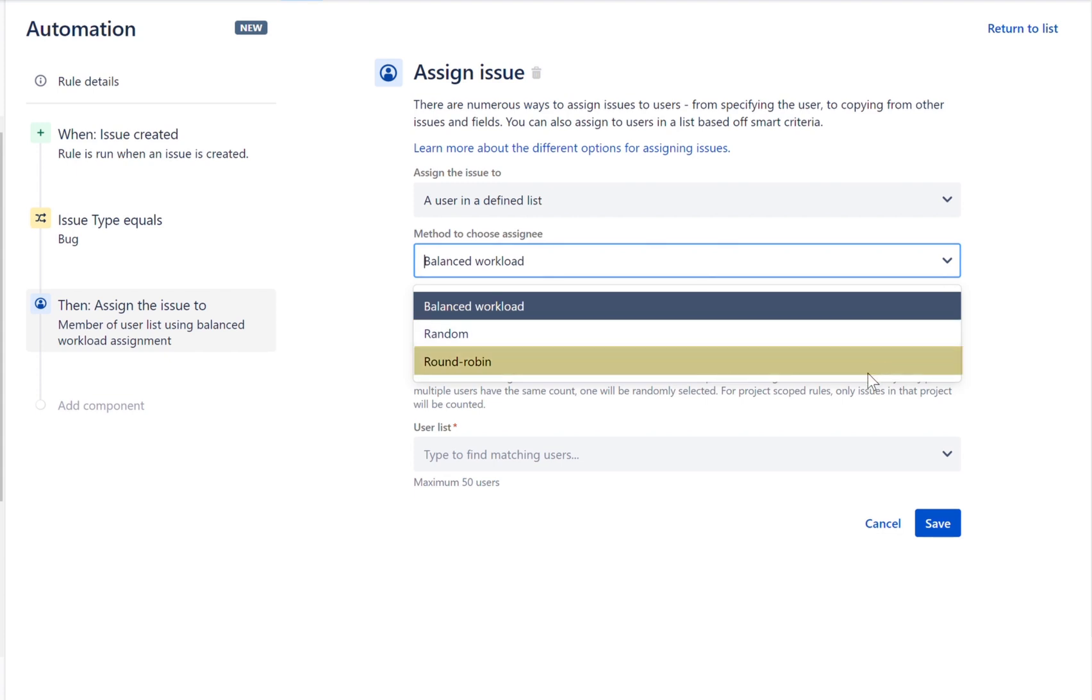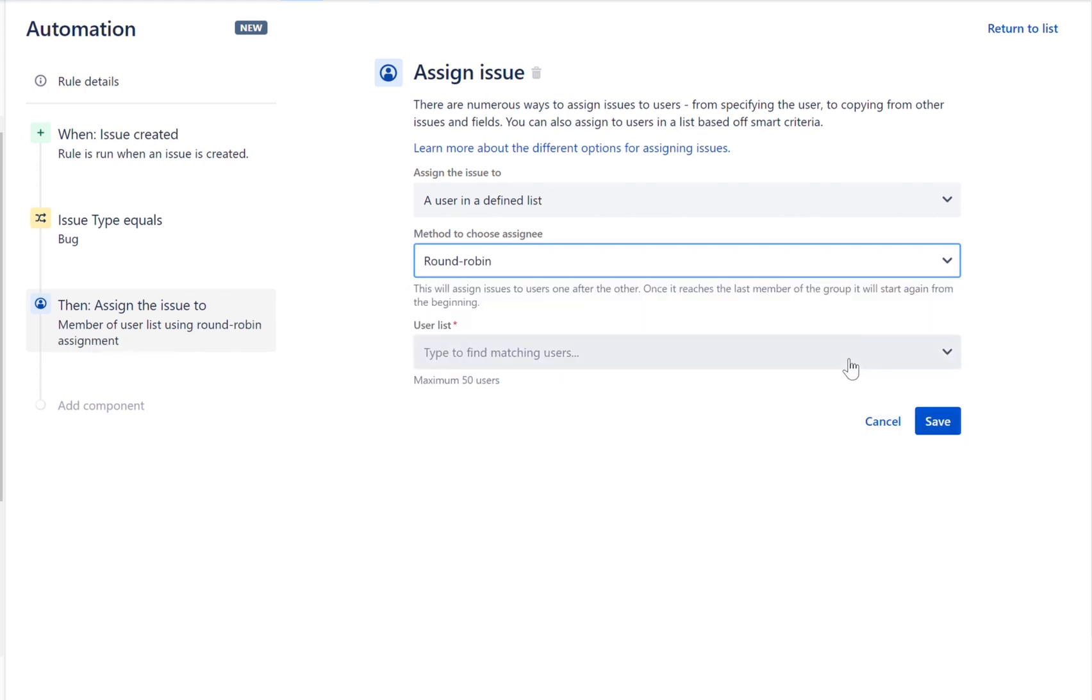A good team takes turns to do those scheduled tasks to make sure everyone has their turn. We now have round-robin assigning. You create the list of users manually, and each time the rule runs, it assigns the issue to the next user. Let's go ahead and select the round-robin option.